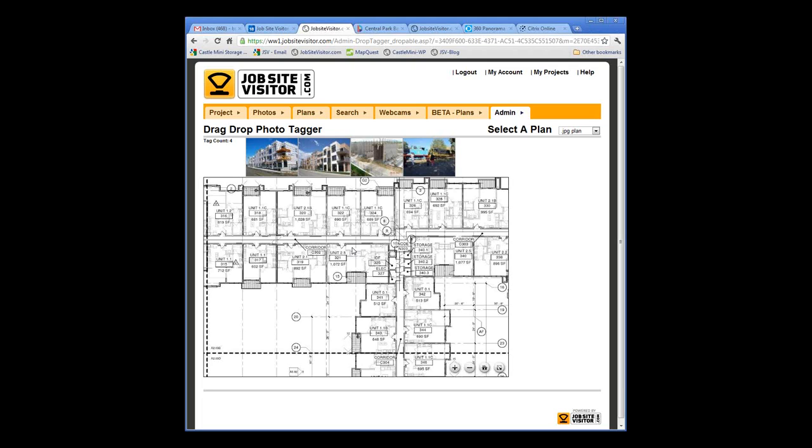Okay, thanks. Who or what position, job responsibility, is it usually to take the photos? In your experience, it's best if a project engineer or intern does that, who's involved on the project, that's on the job site, that understands the technology and the camera and then the tagging. I don't think superintendents should be given this responsibility.